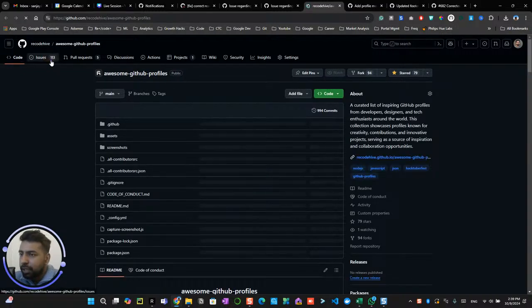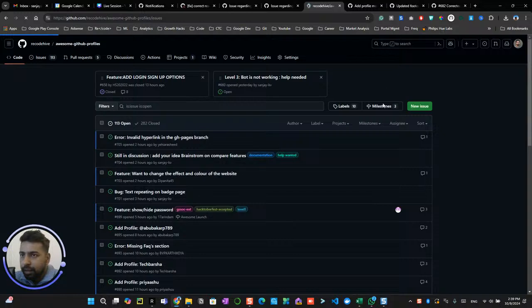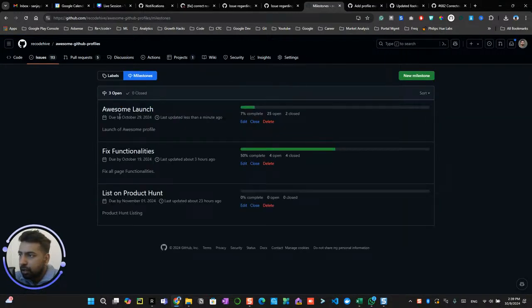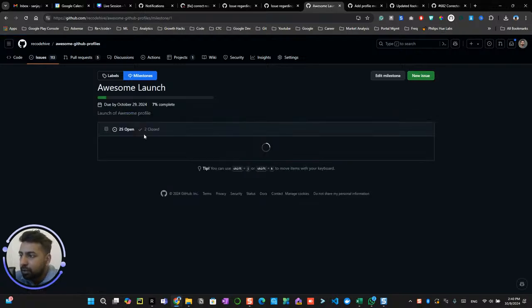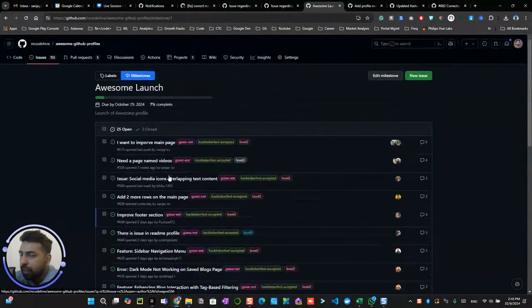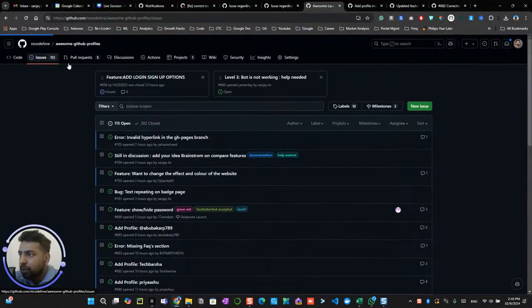So when you go into my issues over here and click on the milestone, you can see awesome launch, fix functionality, list on product hunt, all these changes happening over here. So this is a milestone which I set, and every issue and PR is assigned to the respective milestone, so I can track what changes have been happening to this particular repository and how many PRs have been raised. So this is an amazing way that you can understand.